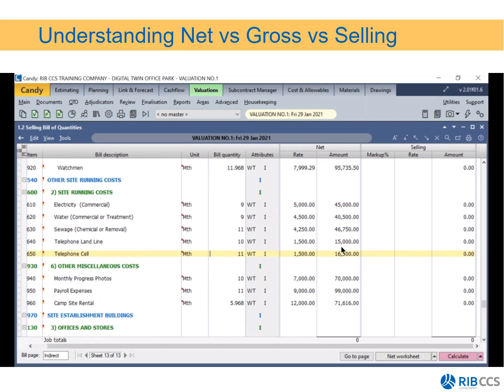So now I've cleared my P's and G's worksheets, I've copied my indirects bill to the main bill, and I've marked the items as internal. So that is then the steps that I was going to do for the post-tender checklist. Next, we're going to just print some reports.